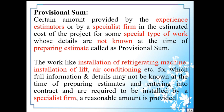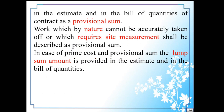For example, work like installation of a refrigerating machine, installation of a lift, installation of air conditioning, etc., for which full information and details may not be known at the time of preparing the estimate and entering into contract, and which are required to be installed by a special firm or specialist — for these, a reasonable amount is provided in the estimate and in the bill of quantities of the contract as a provisional sum.